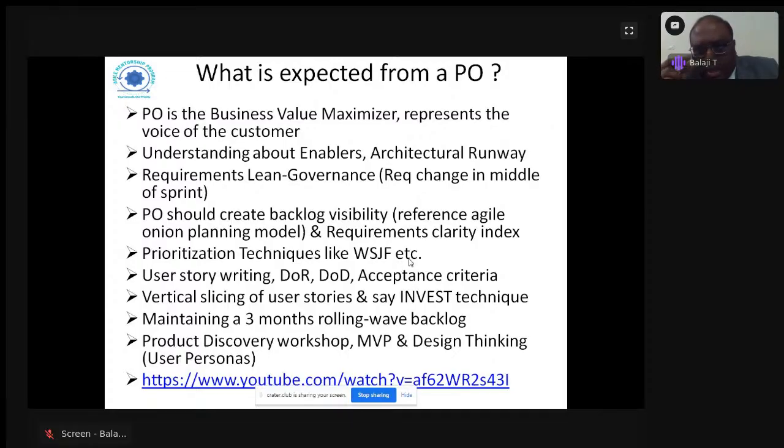Okay, and without creating a REST API service call, I cannot deploy some other business centric features. So though this particular REST API service call is not going to give business value in itself, without the existence or presence of this particular API service call, I cannot deploy my business centric feature. So product owners should also understand the importance of enablers, technical spikes,